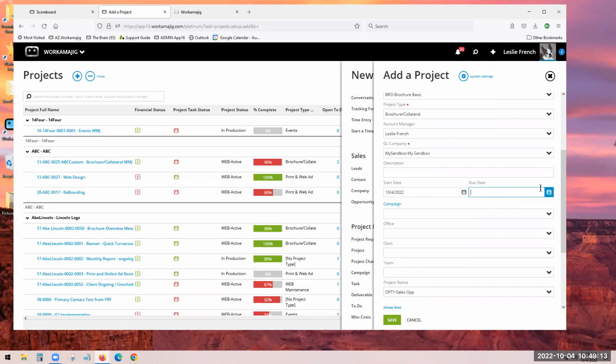We really recommend you use a due date. Have you promised your client a due date of when you would get it to them by? You may have promised a date before the holidays are done. So let's say the end of the week of December 9th over there. Hopefully that gives me enough time, and Thanksgiving is going to block out some of those days. So if I tried to pick it, if you've got them set, it would say, whoop, can't pick that. Like you cannot pick a weekend, it'll push it to the next working day. I'm going to move on.